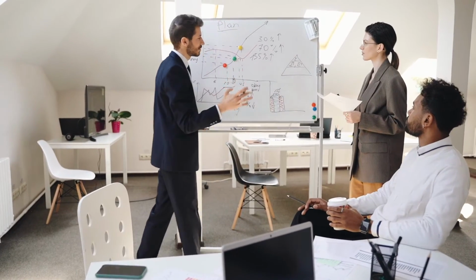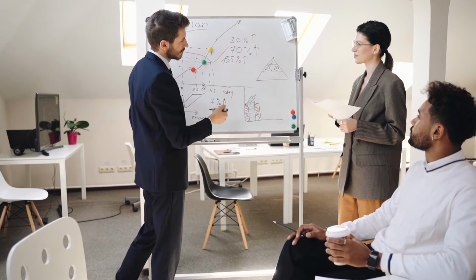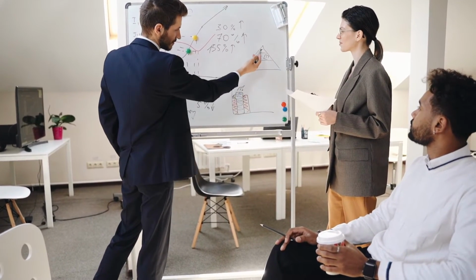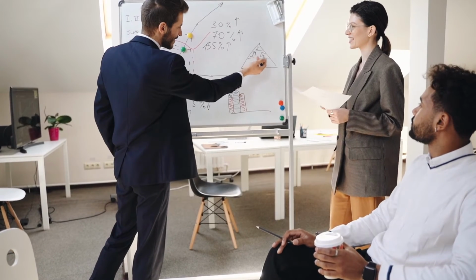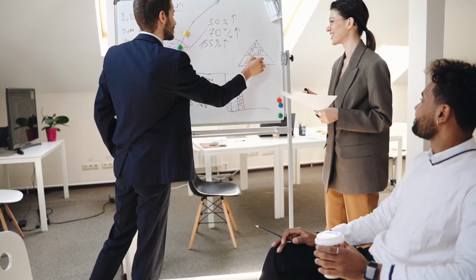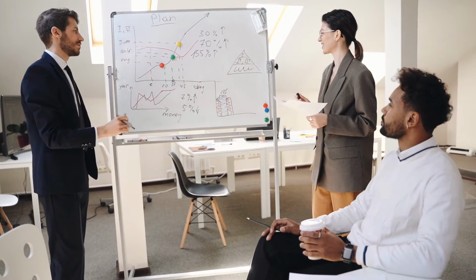Fifth step is to analyze results. The results of the simulations provide a probabilistic distribution of potential project outcomes, such as project duration, cost, or resource utilization. This information is often presented in the form of probability density functions or cumulative distribution functions.